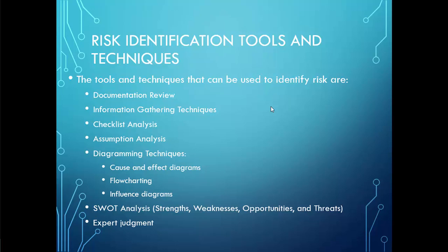There are many tools and techniques for risk identification, such as brainstorming with the project team, and the Delphi technique, where a questionnaire is distributed to experts, responses are summarized, then anonymously recirculated among the experts for comments. This technique is used to achieve consensus of experts and helps to receive unbiased data, ensuring that no one person will have undue influence on the outcome.